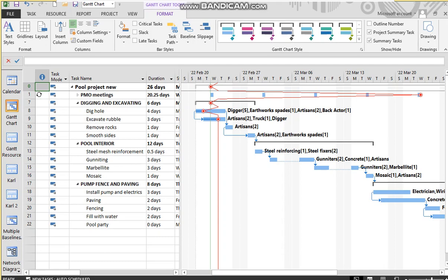What we're about to do is print some of the reports for this particular project. What we're looking at is the Gantt chart, and we're seeing the progress lines, the tracking of the project. We can see immediately, of course, it is slightly behind schedule, because the lines are bending backwards from the progress line, which is set at current date as status date.